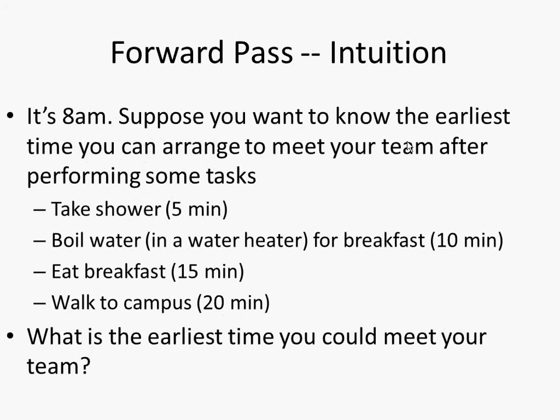You can't eat breakfast until the water is boiling, because that finishes last. It's the maximum of the finish times of both of these. This finishes after 5 minutes, this finishes after 10 minutes, right? And we can't start eating breakfast until the maximum of that. We're going to be waiting for one or the other. In this case, it's for the water. So we take this maximum all the time in our intuition.